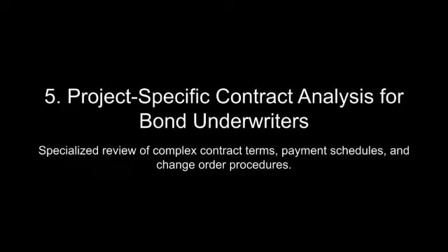While pay if paid clauses offer greater protection for primary contractors and sureties, they are subject to legal challenges in certain jurisdictions, where courts may deem them unenforceable on the grounds of inequity. Sureties must evaluate the legality and enforceability of these clauses during the underwriting process, as they significantly influence the likelihood of payment bond claims. The impact of subcontractor default on primary contractor performance and bond exposure is profound, often creating a domino effect that jeopardizes project timelines, budgets, and stakeholder relationships.